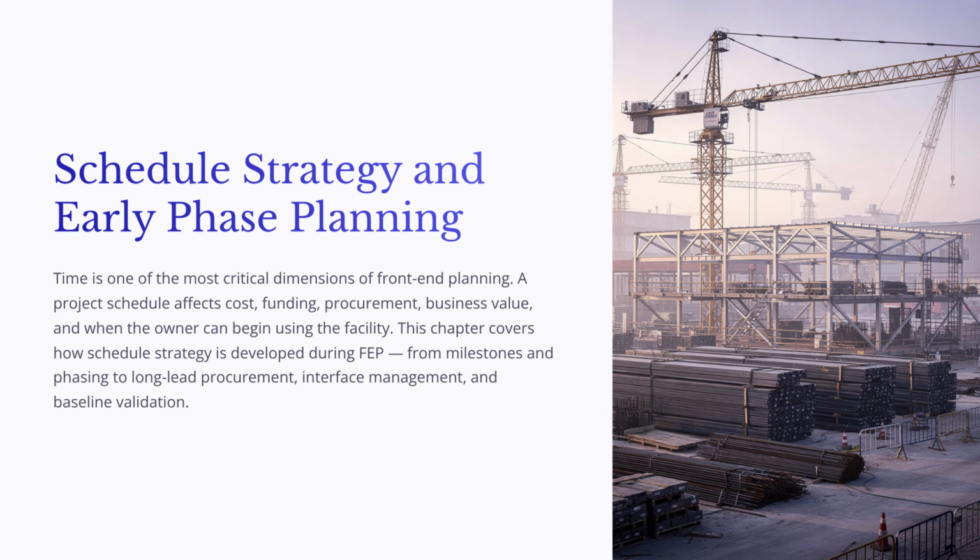Welcome to this lesson on schedule strategy and early phase planning. In front end planning, time is not just a calendar issue. It affects cost, funding, procurement, business value, and the owner's ability to start using the facility. A late project can delay revenue, extend general conditions, miss regulatory deadlines, or disrupt ongoing operations.